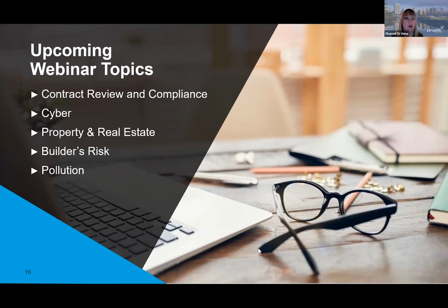Ideally, the requirements to list an additional insured get pushed down to each subsequent sub and sub-tier sub. So in a perfect situation, the contract with the first subcontractor should require them to list both the subcontractor, the GC, and the owner. Further down, subs would have to list the upper tier sub, the GC, and the owner. But the thing to keep in mind with additional insured endorsements is there has to be a contractual obligation.